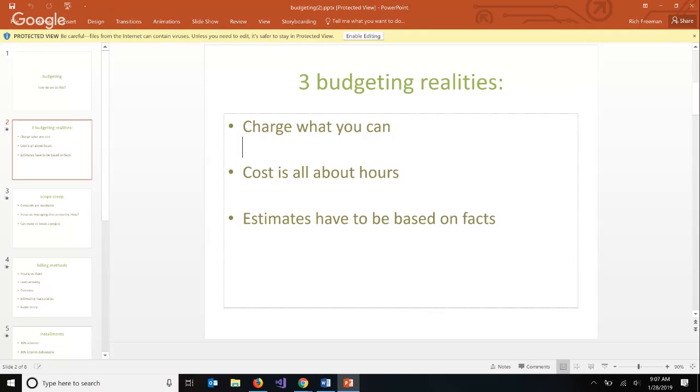So I'm not going to tell you what the right amount is here, but this is something that you guys maybe want to think about as a team, right? Because you'll need to factor this into your budget. Figure out the interactive food map's going to take 500 hours, right? How much are you charging per hour? Because that's going to be what your bottom line budget number will be in your assignment.